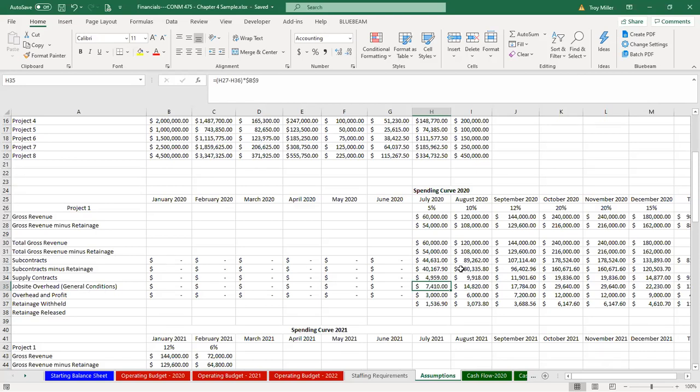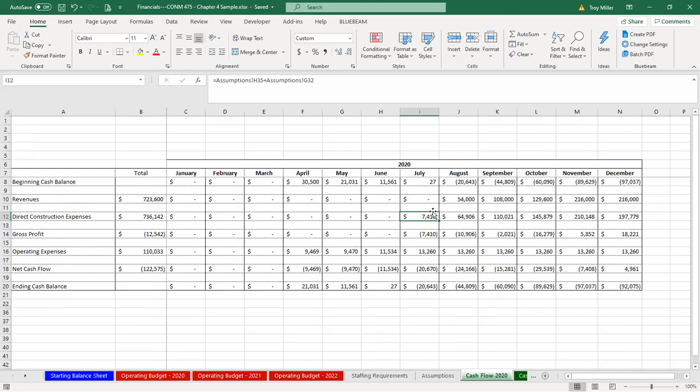So anything that I'm spending as a contractor during that month is basically a direct cost to the project, and I've got to include that. And then I'm going to be a month staggered before I actually count that direct cost to the subcontractor.